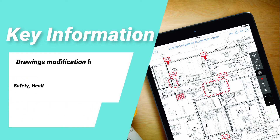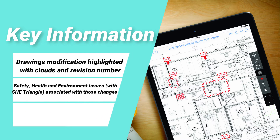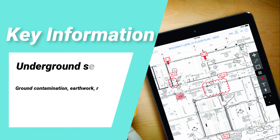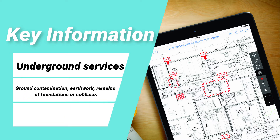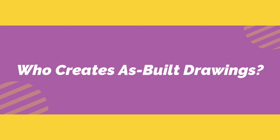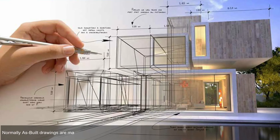As-built drawings include the following key information: drawing modifications highlighted with clouds and revision numbers; safety, health and environment issues with an SHE triangle associated with those changes; underground services; ground contamination; earthworks; and remains of foundations or sub-base.